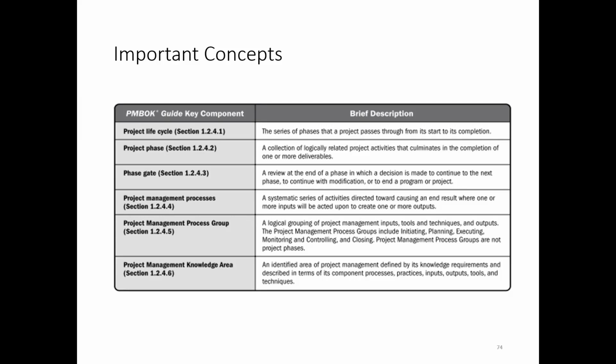And what is a phase gate? A phase gate is a review at the end of a phase. It means that in every phase gate, there is a review at the end of a phase in which a decision is made to continue to the next phase, to continue with modification, or to end a program or project. So that's why it is called a phase gate.